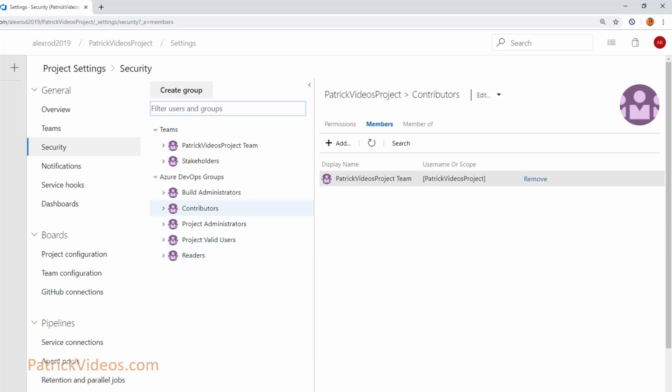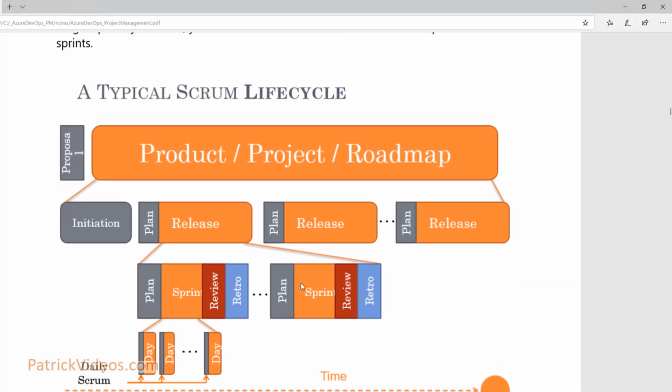once you have done this, the next step is to create the Scrum lifecycle. So in a Scrum lifecycle, a Scrum is nothing but you have multiple releases and sprints. So we need to set up these releases and sprints. So how do we go set up these release and sprint cycles? For a project, a release happens like once in few months, and a release is split up into multiple sprints, and a sprint happens like say once in 2 weeks. A sprint is a short duration milestone. So every 2 weeks you may have a sprint, and for every 4 sprints you may have a release.